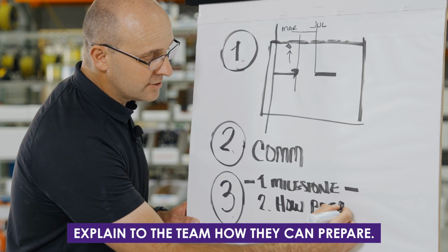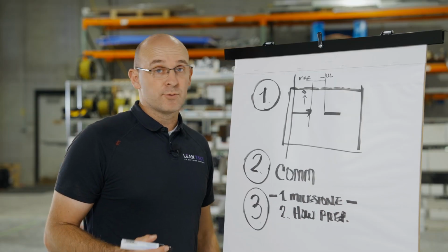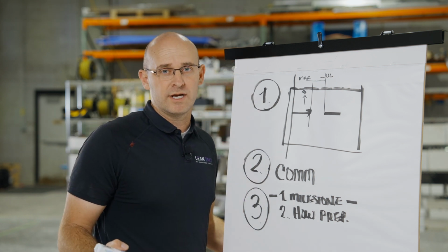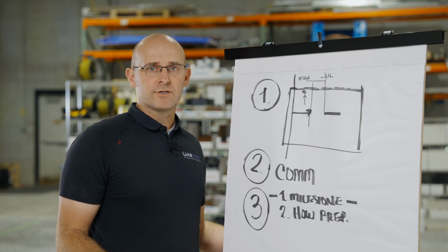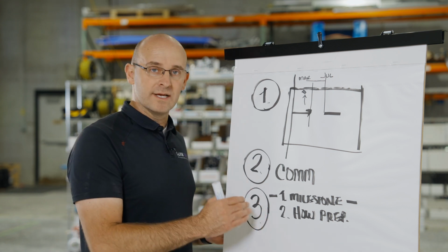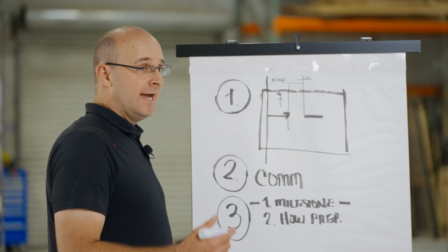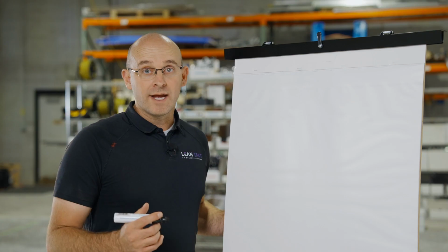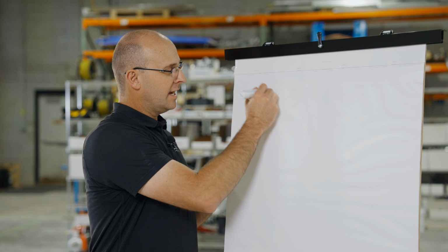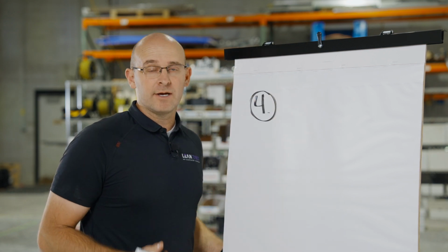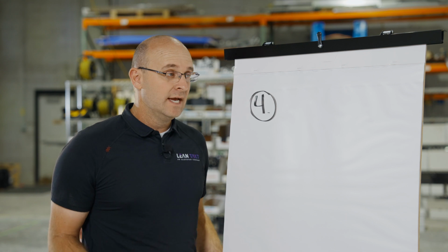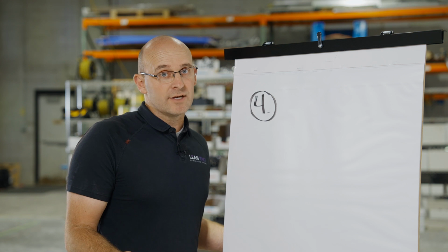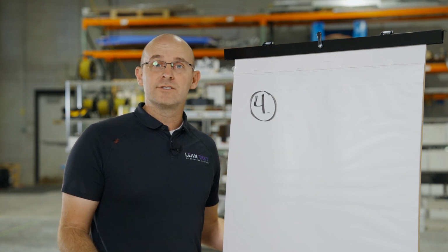And the reason that I'm mentioning this is because you might ask them to pre-fill out their stickies. You might ask them to come up with the sequence themselves by way of preparation. At a minimum, you'll want them to research the drawings and the specs and come knowing exactly how they can participate and exactly how they can prepare for the meeting so that they can be effective while they're in the meeting. Okay, so number 4 is once you have everyone prepared, they've received that email, they've received that instruction, they know their assignments, they've pre-filled out their stickies, they've researched the plans and specifications, they know exactly what milestone we're going to pull to, they know the conditions of satisfaction.